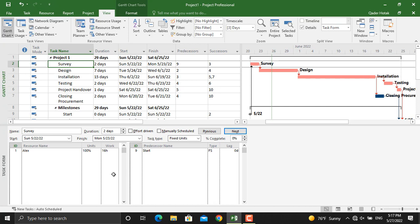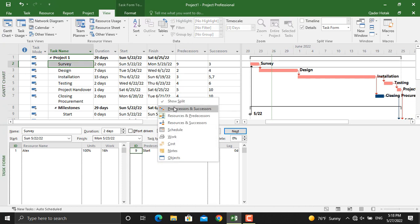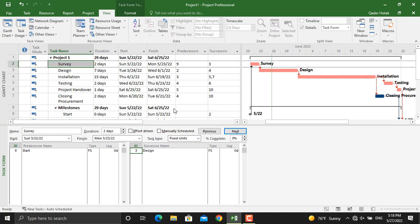We want to see only the predecessors and successors and the relationship between these activities. For that purpose, right-click in this area, click the predecessors and successors. Only the predecessors and successors will be shown. As you can see, the predecessor activity for survey is the start milestone and the successor activity is the design.